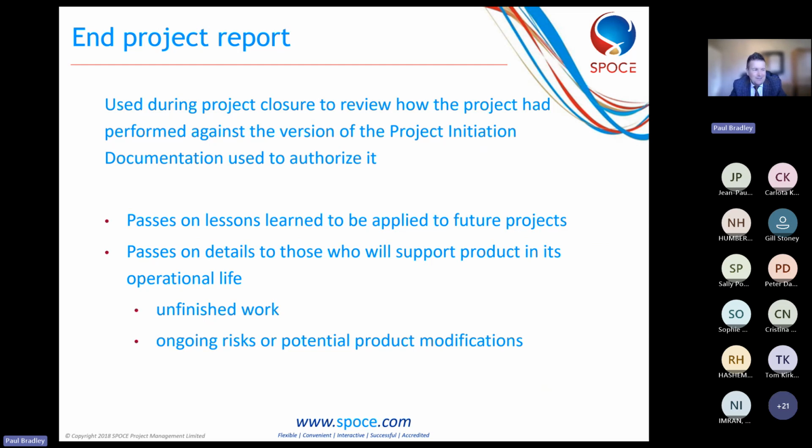The last slide I've got here is end project report. Summarize everything that I've just said into an end project report, which is used during project closure to show how the project has performed against the project initiation documentation. Okay, that's basically your final report.